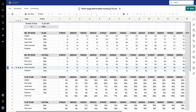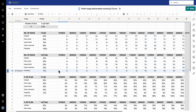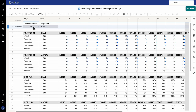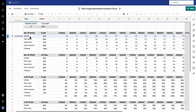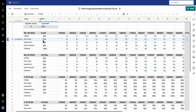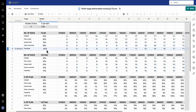So this is how in principle this works. This current view — how do I then turn this into the chart? I've got a more complex sheet that sits behind this, and ultimately that sheet is doing a couple of important things. One: it's looking at the number of documents in the sheet and calculating what's the relative weighting or value of each document to the overall delivery of the project. That helps you ultimately create this curve. The other piece is: for each one, what is the relative value of each stage? So for the first stage, when it's initiated, that is worth 20%; when the document is at peer review it's 50%; issued to the client 70%; client comment 90%; then published.